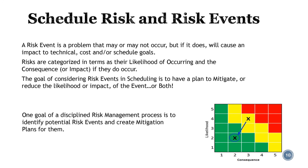However, not all risk events are mitigated to zero likelihood. For those that are not, and for which a time impact to downstream activities is possible, they need to be factored into the Monte Carlo analysis in a similar manner for uncertainty as how accounted for in determining cost contingency and confidence.